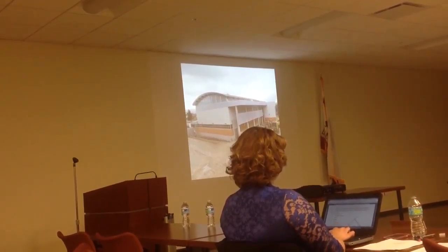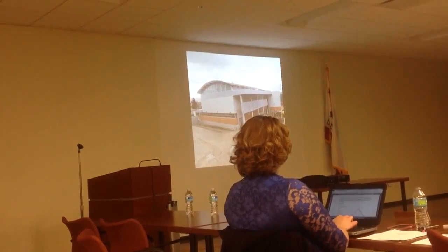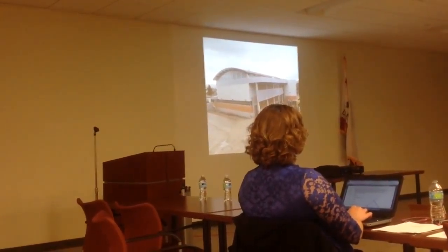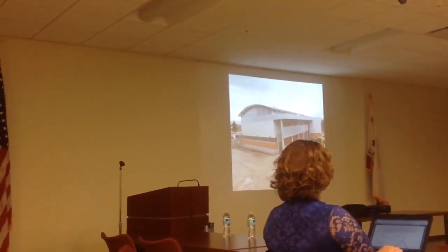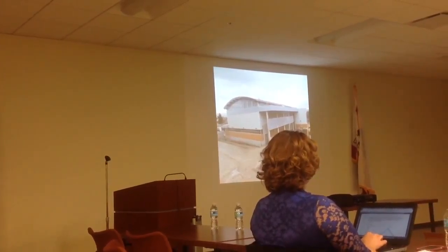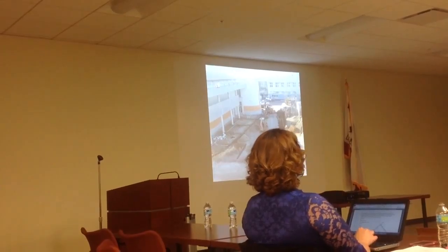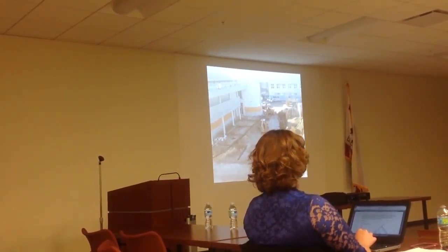So this is the Sylvester Greenwood Academy, looking down from the LPS side onto the gym. One of the things I just really brought this up, during the recent rains that we had, we approved the change order to go ahead and lime treat the site so we could work on this during the inclement weather. And we were able to do that. You can see what happened immediately after the rains. The site was dry enough to do the trenching and start with the site improvements. So that was a success for us.